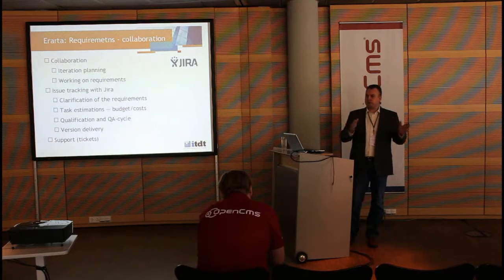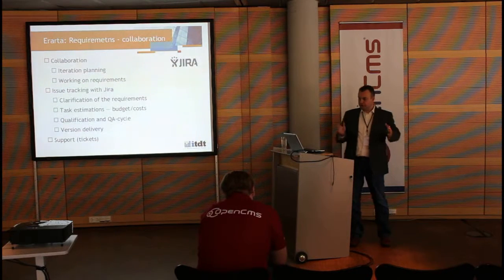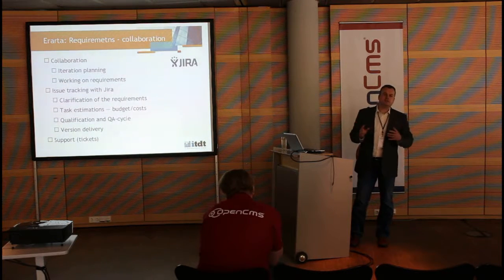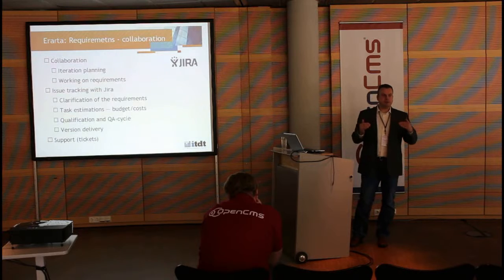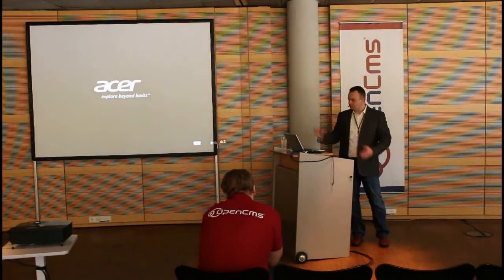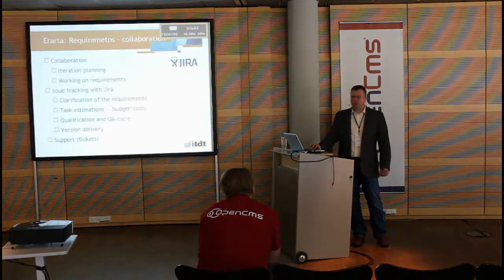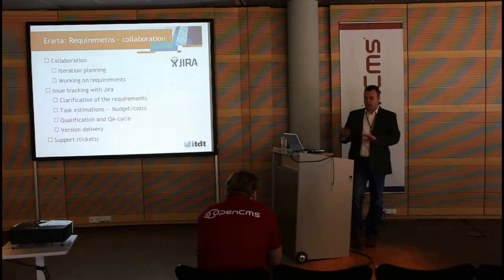And we assign certain tasks or extensions to a certain version. If too much was generated from the head, we just move it to the second version, third version, and so on. Of course, all future versions could be reordered, or we play around because priorities change. I mentioned this in the very beginning. Sometimes it happens that the customer says, okay, maybe in the next 6 months I would like to have a certain feature I have just seen on a competitor web page or just on a web page which I like. And then they could call next month and say, well, it would be nice to include this in this release, is it possible somehow? And we try to play around.